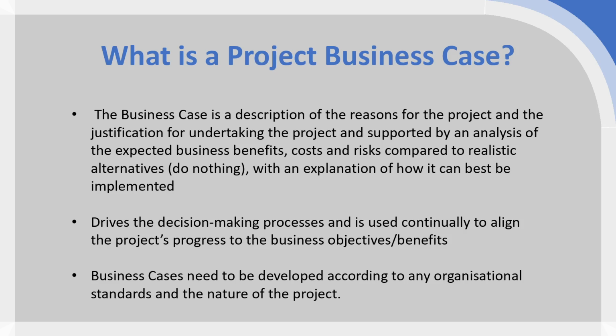Justification for the immediate need for the project, as well as an analysis of the expected business benefits, as well as the disbenefits, the costs and the risks, and an explanation of how it can really be implemented. So the best way to think about this is not just as a one-off document, but a live document which is maintained throughout the entirety of the project lifecycle.